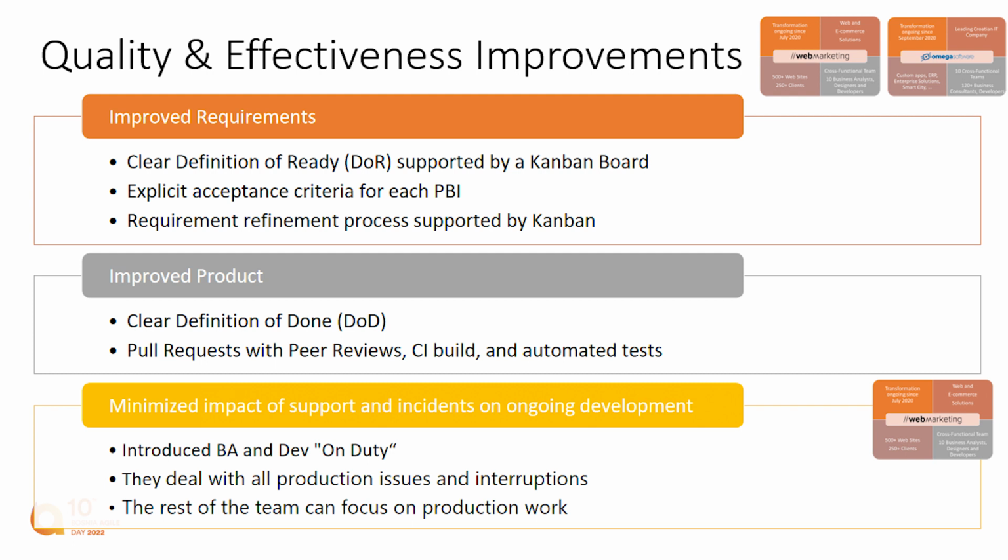So there is that pair that takes care of any incoming second level support requests, which are exceptions, which can happen anytime and could disturb the Scrum team doing the work based on the sprint backlog. So these do the triage and try to resolve those exceptional pieces of work without disturbing the team. So thus protecting the capacity of the team.